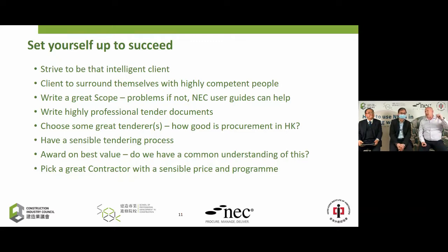Have you got an outstanding anti-slavery policy? Tell us about your well-being policy with your staff. Show us your payment records for your subcontractors. Tell us the amount of training days your operatives actually have. So tell me about your QA system. Don't do essay style questions.